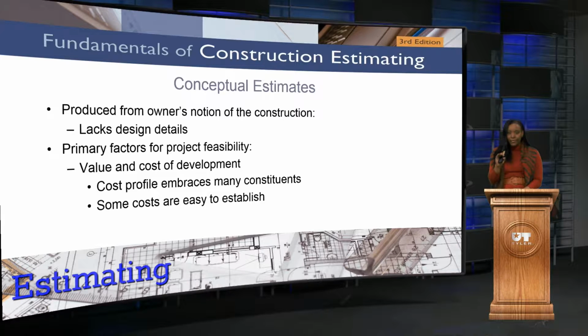And generally, just so that you know, it's before the construction drawings and the specifications are actually made available, because you really won't have drawings and specifications completed until it gets more into that preliminary side and you get past the schematic designs and get more into design development. And definitely you should have them by the CD stage. And we'll talk a little bit more about this here in a minute.